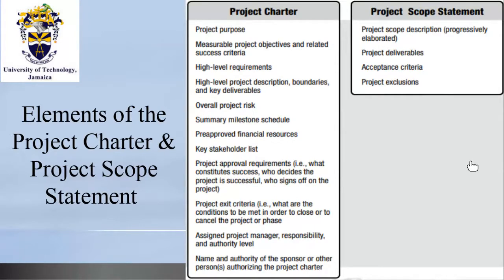You want to repurpose that building to become a training room. So the repurposing, the scope will entail the clearance of the building. The scope will entail renovation to the building, and you describe what renovation entails. And it will also include the installation of air conditioning units to comfort X amount of people.